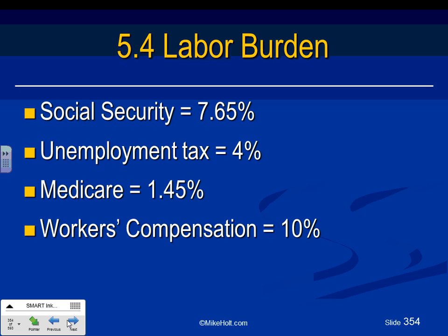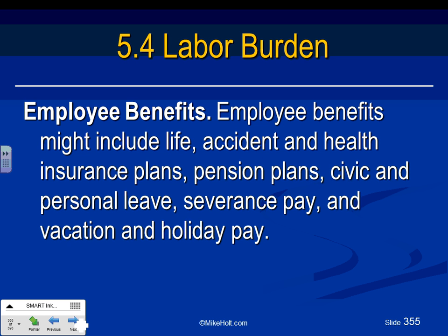In any business, not just in this business. Employee benefit. Then you have to add employee benefit. You're going to give them dental, right? Medical, pension, God forbid, 401k, and all these benefits that you're going to do. The package, guys, that the 292 is giving right now, is it 64, something like this, Darren? 64. That will include $33 bring home, and the rest is another $31 as benefits and dues and other things. So you have to accommodate, guys, for all this stuff. Any comments, any questions?